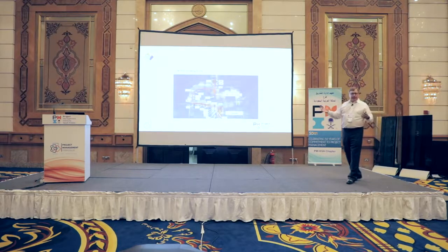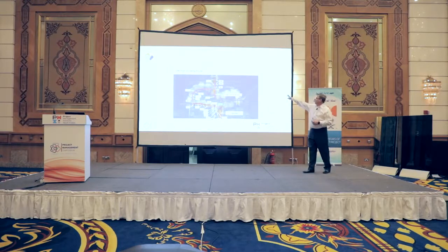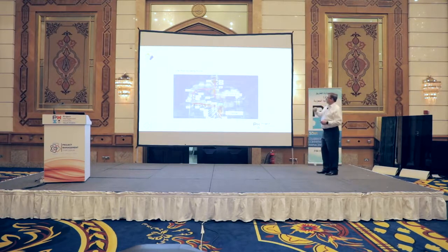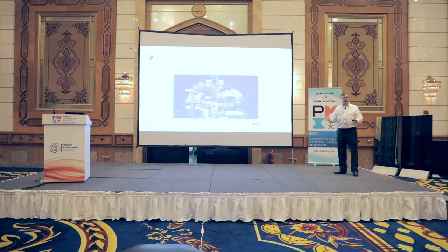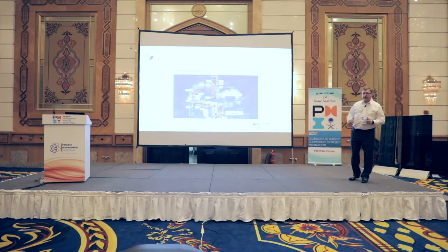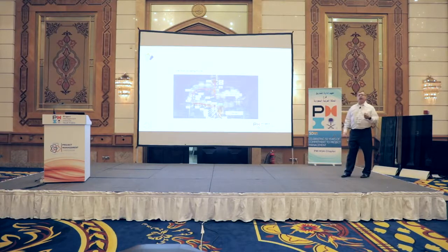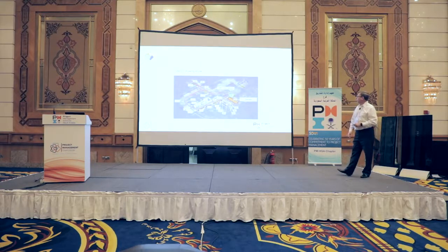So that's all great. Some nice pictures. But what did we learn from all that? Well, the clashes. This is what's important to us. We have two types of clashes. Clashes in yellow are the close clashes, when we're close to something. The clashes in pink are the hard clashes, where we're going to have an interface with something existing within the facility. So let's take a look at some of these clashes up close.